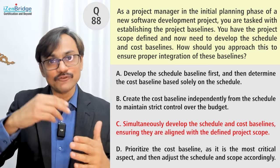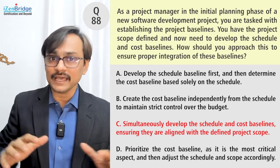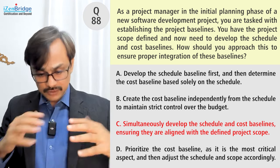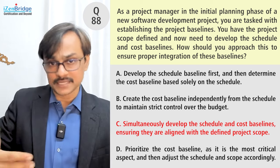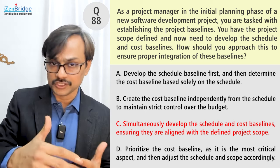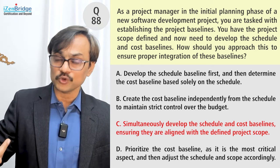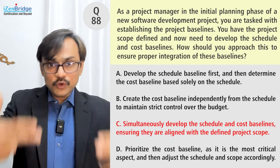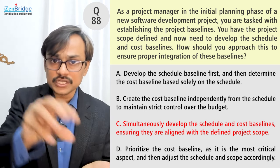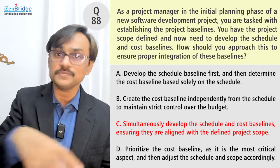Option C: simultaneously develop the schedule and cost baseline, ensuring they are aligned with the defined project scope — great idea. It doesn't mean working line by line at the same time. Rather, you prepare a project schedule, prepare the associated cost, present both, and if an issue arises in the schedule, you update it and update the cost too, presenting both together.